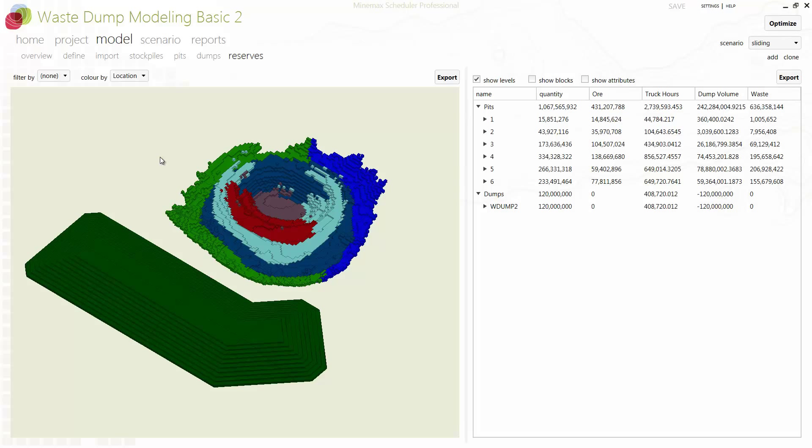Until now, the practice has been to separate the pit scheduling process from detailed waste dump scheduling. This can lead to a time-consuming, iterative approach which is non-optimal.